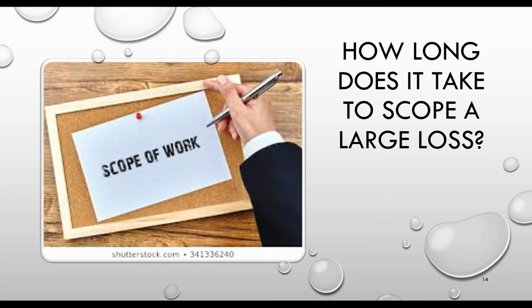But your initial scope on the water damage would be extract water, prepare for equipment arrival, set air movement, dehumidification equipment, maybe pick up some debris or move some contents around. And then the last line would say a more detailed scope will follow once we've assessed the loss more thoroughly. And then don't forget to do that.